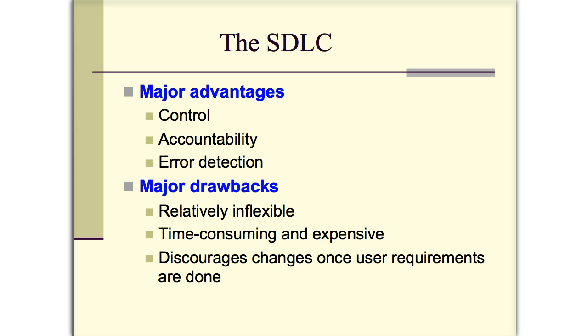From every phase, when we talked about those 6 different phases, every phase has to be signed off by the managers that are in charge of the project, or the major stakeholders. So it has that level of accountability to it. As the project team member or the project leader, you get sign off to move to the next phase.